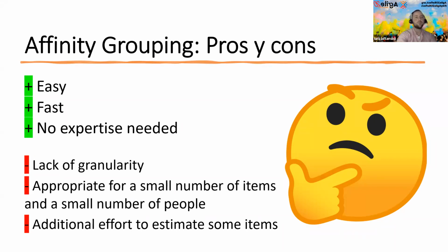The most important thing is to check and compare what's been estimated to what's been done and delivered at the end of the sprint. If you do this, it's good. If you don't, it would be a good practice to start doing this, because it would help you to involve the whole team in this practice.